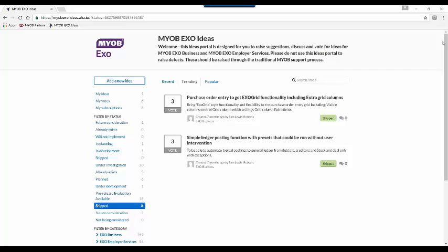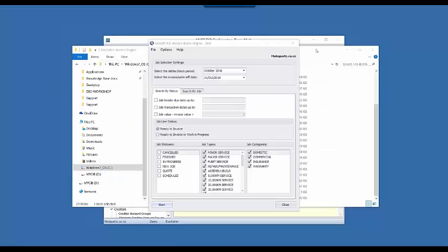So you can have a look in there to make sure that that job is tracking, particularly if you've got a long lead time on jobs. When you set up the budget or the quote against it, the turnaround might be a few months before it's invoiced, and costs can fluctuate quite significantly in that period of time. So at that point, you can keep an eye on it, periodically check that tab or run that report, and see how you're tracking against what you envisioned this job being worth to you when it was first opened.